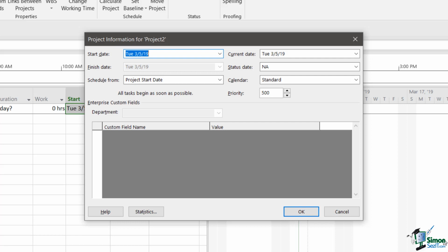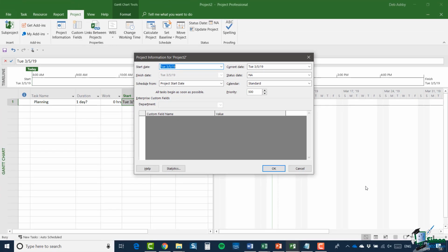The approach we're taking now with planning this wedding is that we're starting at a start date, and when we've done all the planning and got all the other activities in, we'll know when we can be ready by. So we haven't got a date for the wedding yet. We need to do a lot of work to do a lot of planning first, but we will find out when we would be ready to have the wedding by. So let me cancel this dialogue for now.